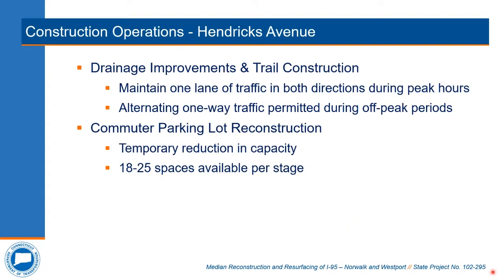At this point, I will be switching to a discussion of construction operations and their associated impacts. We'll begin with Hendricks Avenue. During the construction of the drainage improvements and portion of the Yankee Doodle Trail as shown previously, the contractor shall be required to maintain one lane of traffic in both directions during peak travel periods. During off-peak periods, he will be allowed to establish an alternating one-way traffic operation.